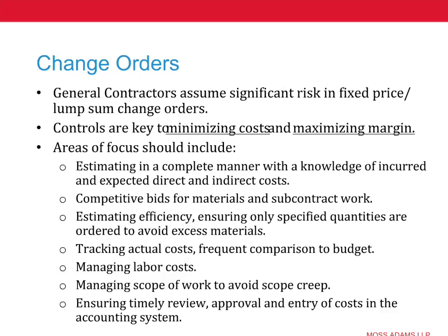A lot of organizations that we work with definitely want to, and they definitely do, put change orders forth, and I don't know many that don't, but a lot of them miss added scope that the owners asked for. They're doing, we'll do this favor, we're going to do this other scope, and pretty soon all those favors turn into a lot of extra cost on the project that is not even contemplated or addressed. Or there might be the engineering drawings aren't such that you can actually build the project from it. They aren't far enough along.